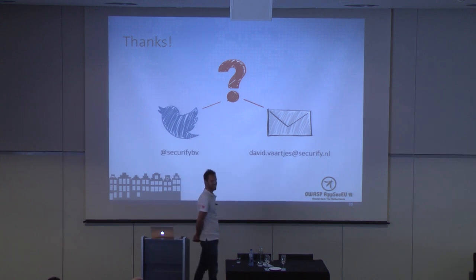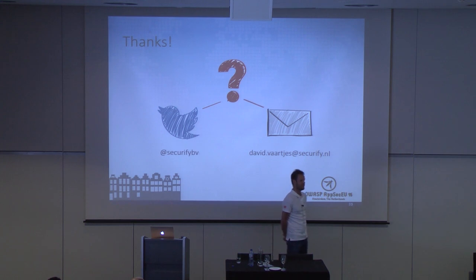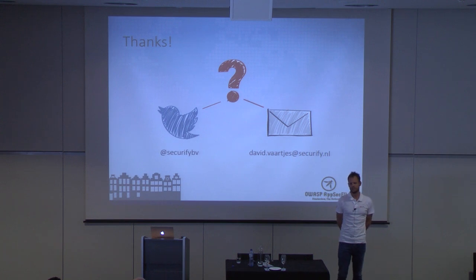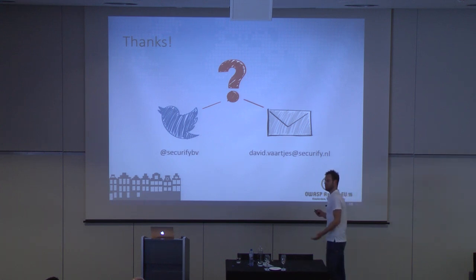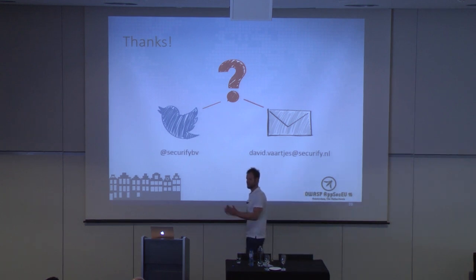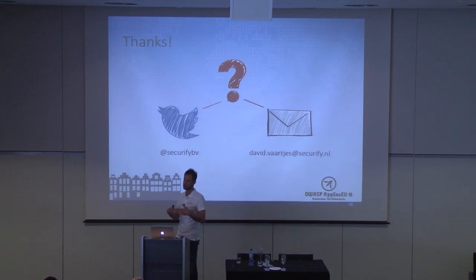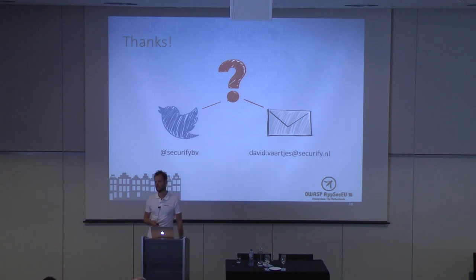I think you can do the math on that. We needed about 4 to 8 hours per team. When supporting multiple teams together, like 5 or 6 teams, maybe 7, sometimes teams are really low on what they produce, and other teams are really working hard. So if you shift between teams and take an average of 4, 6, or 8 hours, depending on what they're working on, you should be able to cover. Maybe just start easy. Start with 5 teams, and try to find your way up to supporting more teams. So, okay, 50 teams, 5 guys, so 1 on 10, I think.